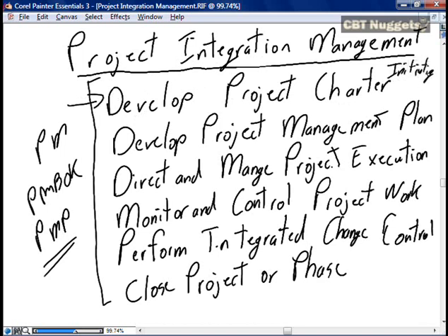And with the project charter set, we will present that to the business. We will validate that our project is equipped and prepared and defined to address the business case, that it is a justifiable project, and therefore we have formal approval to proceed. With the formal approval to proceed, we develop the project management plan. That completes our project planning activities.